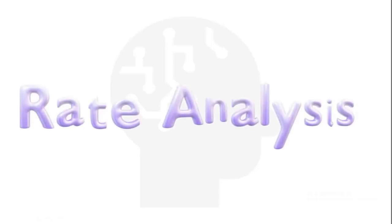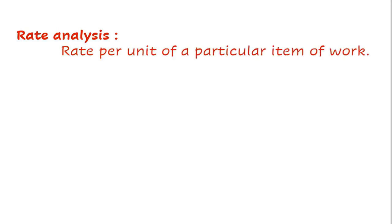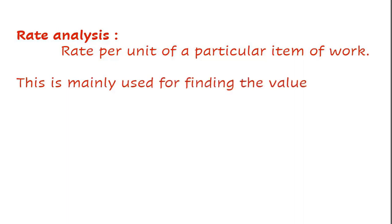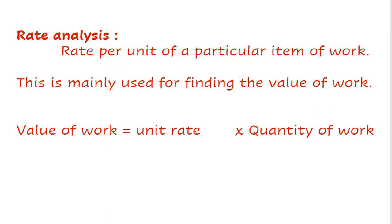Today we are going to learn about an interesting topic: rate analysis. Rate analysis is defined as the rate per unit of a particular item of work. It is mainly used for preparing estimations, budgets, cost reports, and cost analysis for construction projects. The value of work is equal to unit rate multiplied by quantity of work. For example, 5000 rupees per cubic meter as a unit rate and 10 cubic meters as quantity gives a value of work equal to 50,000 rupees.